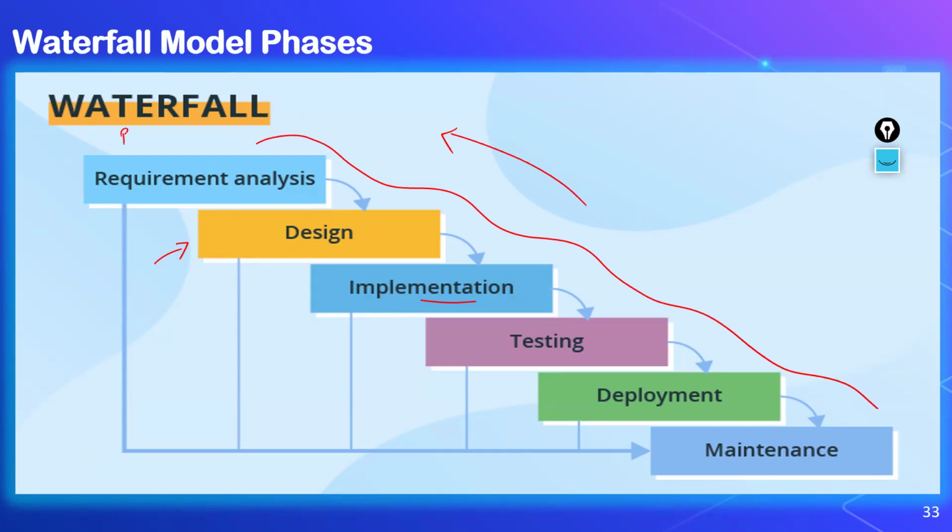See, there is planning as well. It's not that planning is not there, but it's combined with requirement analysis. This implementation is your development phase. That's how it is. So you must complete a step for the whole project. Whole project requirement analysis, whole project design, whole project development, then only are we moving further. So partial implementation of any stage is not allowed.